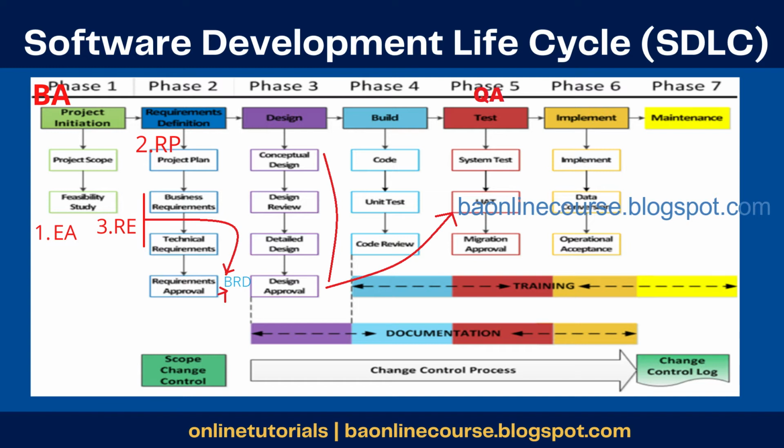Now there are some frameworks like use cases or user stories or ER diagrams. There are multiple ways in which you could document your requirements. Okay, all that is done using those analysis and documentation techniques. So the end deliverable of this is your BRD. Okay, so a BRD is created as part of your phase 2. Then you take this to the customer, who would approve it, and then that's where phase 2 is completed, which means your requirements are completely captured.